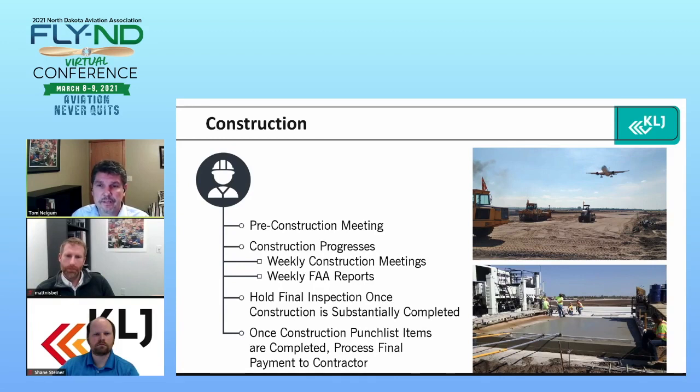Those meetings, the focus is to talk about safety, talk about security, talk about submittals, what's due, what does a contractor have left to complete as far as submittals, talk about a summary of what the contractor's doing this week, what do they plan to do next week.